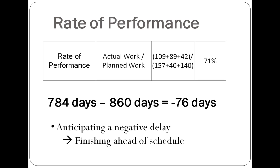If this rate of performance is multiplied by the planned duration, the estimated project end can be obtained, which is likely to be even less than planned since the rate is less than 100%. Therefore, a negative delay is anticipated. A different way of looking at performance is to subtract the initial entire project duration from the updated duration, which is 784 minus 860, or 76 days ahead of our planned schedule.